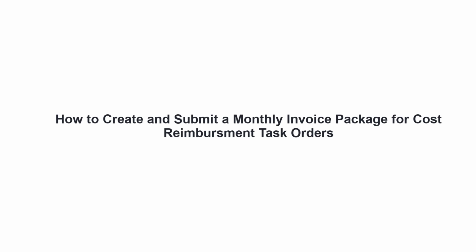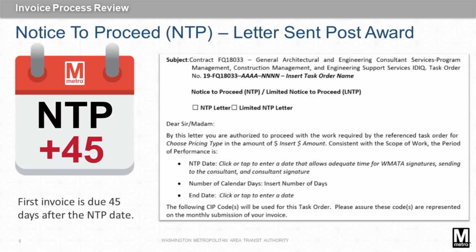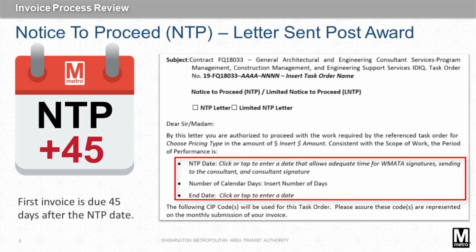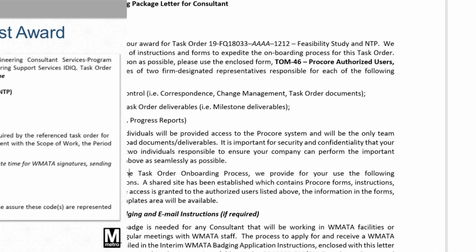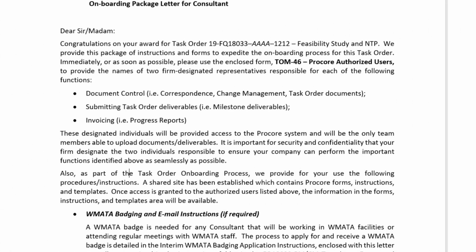In this video, you'll learn how to create and submit a monthly invoice package for cost reimbursable task orders. When a task order is awarded, the prime consultant receives their notice to proceed and onboarding letter. The notice to proceed letter contains details of the task order, including the notice to start and contract end date. The onboarding letter provides details and guidance for management of the task and instructions for using Procore.